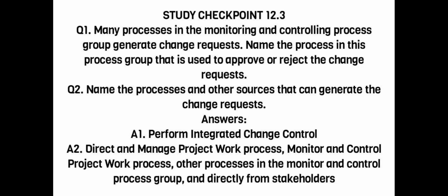Study Checkpoint 12.3. Q1. Many processes in the monitoring and controlling process group generate change requests. Name the process in this process group that is used to approve or reject the change requests. Q2. Name the processes and other sources that can generate the change requests. Answers: A1. Perform integrated change control. A2. Direct and manage project work process, monitor and control project work process, other processes in the monitor and control process group, and directly from stakeholders.